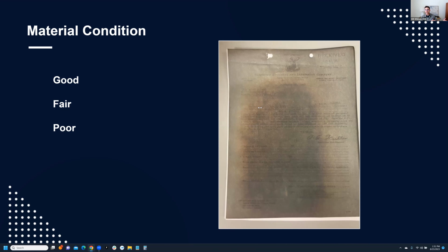Just like the boxes themselves, no one's ever really sure if everything is consistent. And just doing that research can be costly. Or we think it's like this, we're using this one CD or these two CDs as the kind of benchmark, and we'll assume they're all like this. And if they're not, we have to keep stopping, keep testing, keep going back and forth to figure it out. A lot of times that is what slows down projects or makes them a little difficult. When clients don't know what's on there, we don't know what's on there, you find stuff along the way. It's absolutely doable most of the time, but it causes that kind of chunking along instead of a nice, clean, consistent project. That's just something to keep in mind.